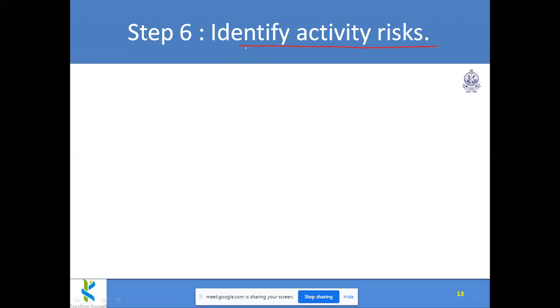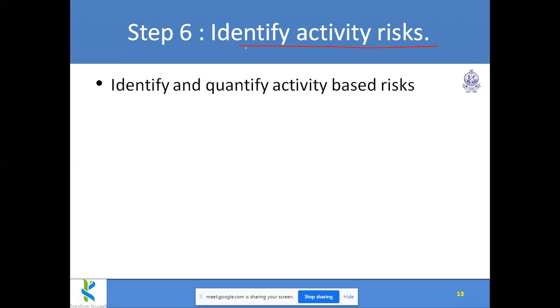Okay, likewise, this is one small example, but risk may be in continuous rain, or Corona, another risk. We have started constructing the building and Corona came, lockdown came, no person is coming, everything stopped. But I got a loan from the bank, this much money in hand, no activities carried out, but I have to pay interest to the bank. So many risks may come from different perspectives.